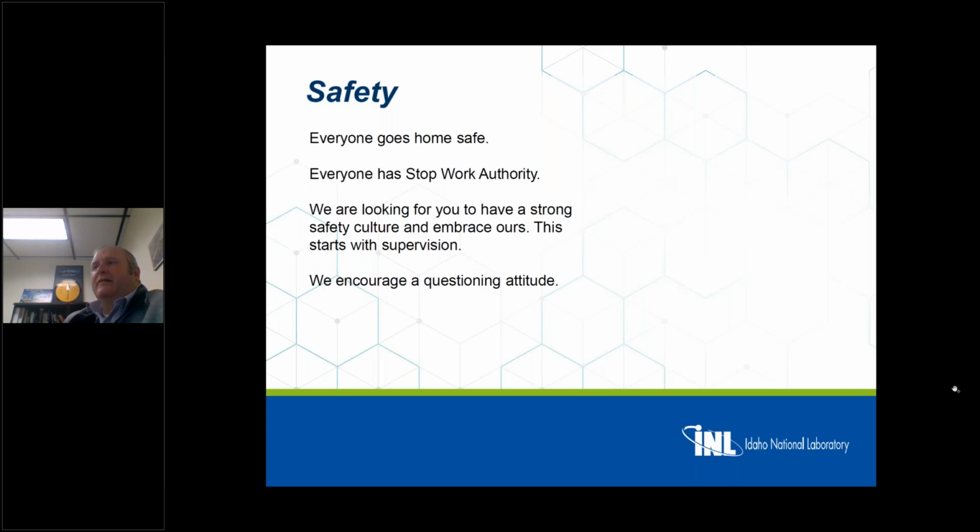The big thing for me, the big thing for my staff, the big thing for INL is everyone goes home safe. That is probably the number one priority that we have, is everyone goes home safe. Because of that, everyone on site, whether it be the subcontractors, anyone working for the INL, they all have stop work authority. That means if someone has a question, someone thinks something's not looking right, they can ask whoever's doing the work to stop and take a step back. Is this right? Is this correct?